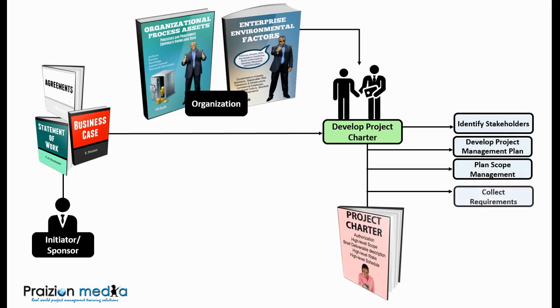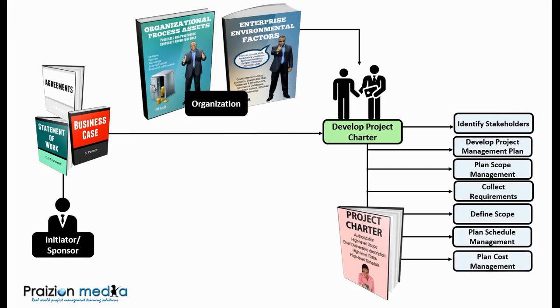But in addition to that, the project charter is an input to collect requirements and define scope. So if you can get it down in your head that once this charter is developed, I will use it to flesh out the detail. I'll use it to understand who my stakeholders are. I'll use it as I develop my overall project management plan and for my subsidiary plans of scope and time and cost and also risk.